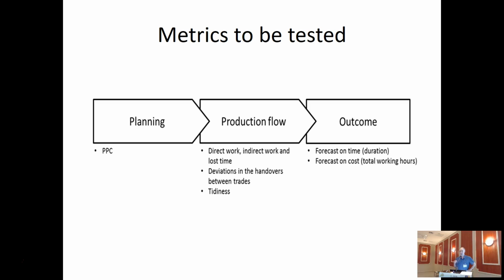We think that if you don't go for 100% of PPC, we can't use it in this kind of dashboard, because we can't communicate with people. You have a PPC of 85. Is that good? Is it poor? Whatever. It doesn't make any meaning. And there are other arguments too. So we go for a PPC of 100 here.